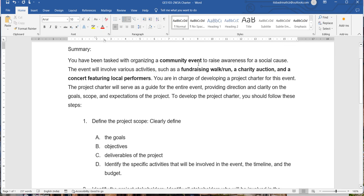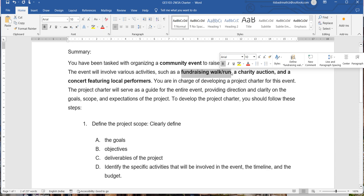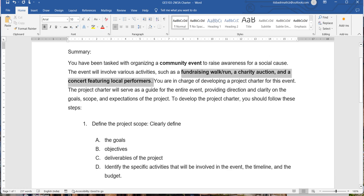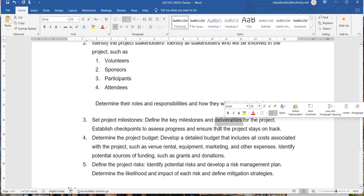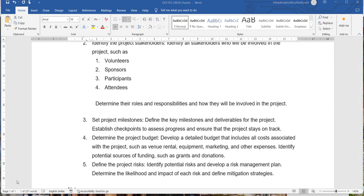For example, if the activity is conducting a fundraising walk or run, that becomes one milestone. If all activities are conducted together, you will be dividing them into planning, implementation, and testing phases. You can mention the key goals as milestones, and for each milestone there will be a certain deliverable that should be explained. For each milestone, you should mention the start date, end date, and what activities will be carried out.